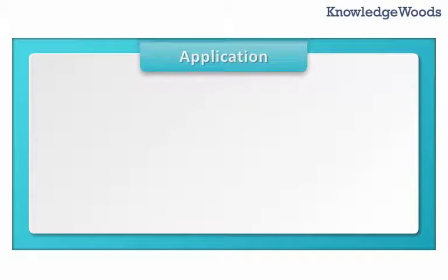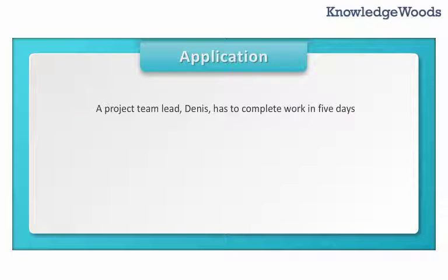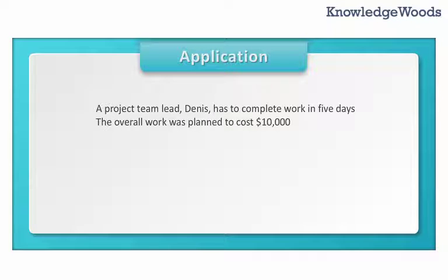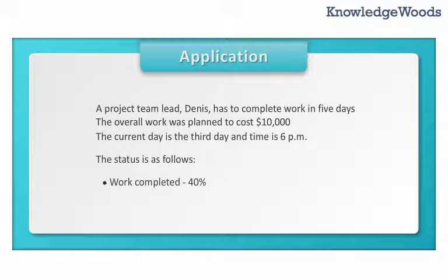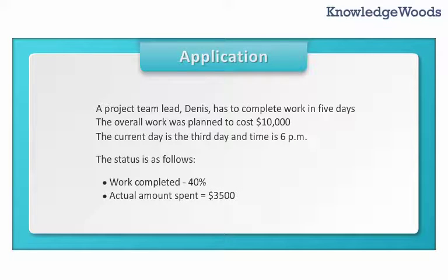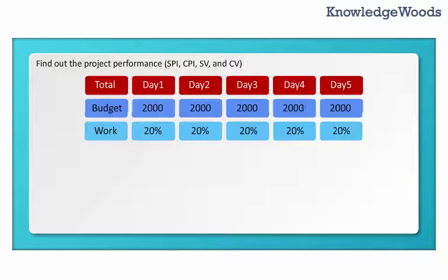Application. A project team lead, Dennis, has to complete work in five days. The overall work was planned to cost $10,000. The current day is the third day and the time is 6 p.m. The status is as follows: work completed is 40%, and the actual amount spent is $3,500. Find out the project performance.